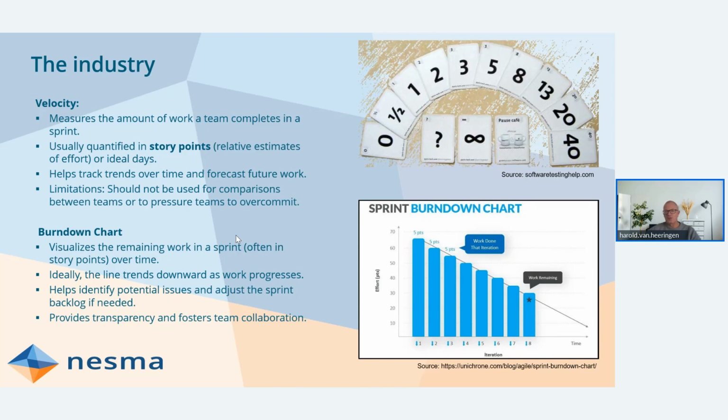This is what's happening in a lot of teams, and this is what I also encounter a lot as a consultant talking to senior management. They say, yeah, okay, our teams are doing story points, but I can't compare the teams to each other because these story points are different for every team. They also use this Fibonacci scale, so a 5 is not necessarily almost twice as big as a 3. There's no ratio scale there. It's just a relative ordinal scale. So you can also not really rely on the metrics because of that same reason.